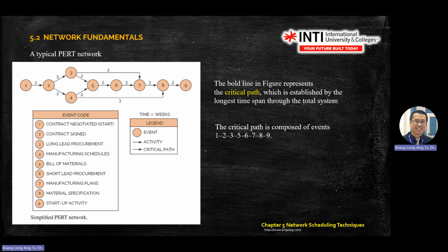The last method, the fourth method, is calculating the slack. Slack is when you take the earliest start and the latest start, and you get a number 0. That is a critical path member.